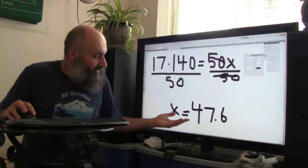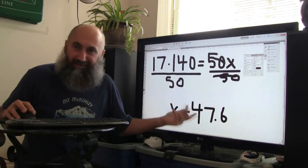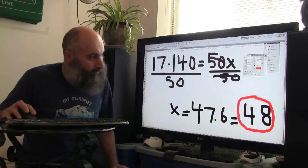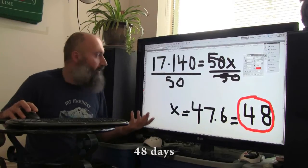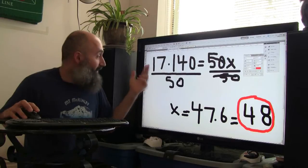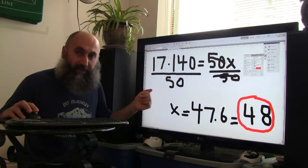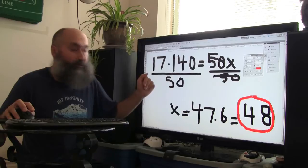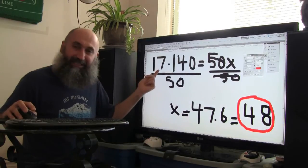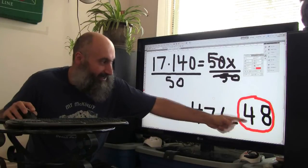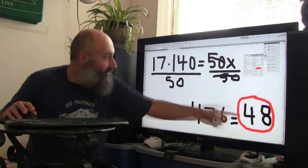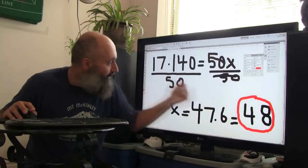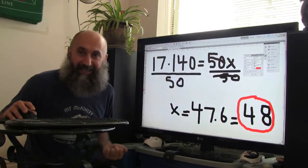So 140 videos is going to take me 48 days total based on my current pace. I've already gone through 17 days of that and gotten 50 videos done. It was going to take me 48 days to do 140 videos, but I've already got 50 videos done in 17 days.